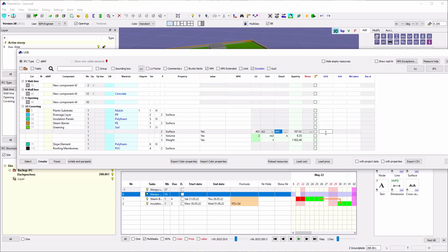It's a really slow worker in this example. So maybe I would need 2 hours for 1 square meter, and I just work 4 hours a day. And you see already how many days I need for that. So here is the number of labor. So maybe I ask my colleagues, and we are 2 persons or 3 persons. So you see the durations would go much smaller.